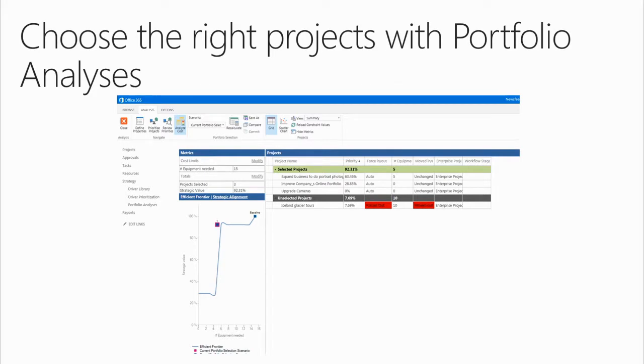We end up using 15 pieces of equipment. And if we actually take this project out, we can do about 95% of the project with only 4 pieces of equipment. So you can play around with that and say this one will require a lot less resources if we don't do this project, and we still get X% of our final target. So you can start playing with this.